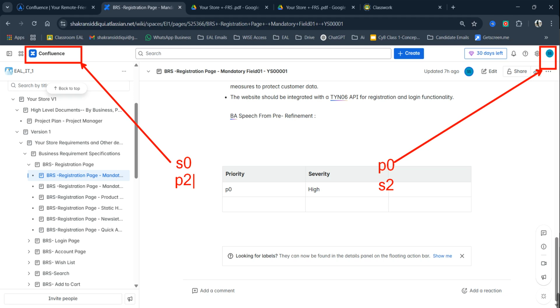Now we need to determine which one we need to fix first. So based on the priority, we will need to fix the login first, then we can fix the logo. Logo can wait, but if the customers cannot log in to my online store or online web application, they simply cannot browse through products, let alone buy or purchase them.